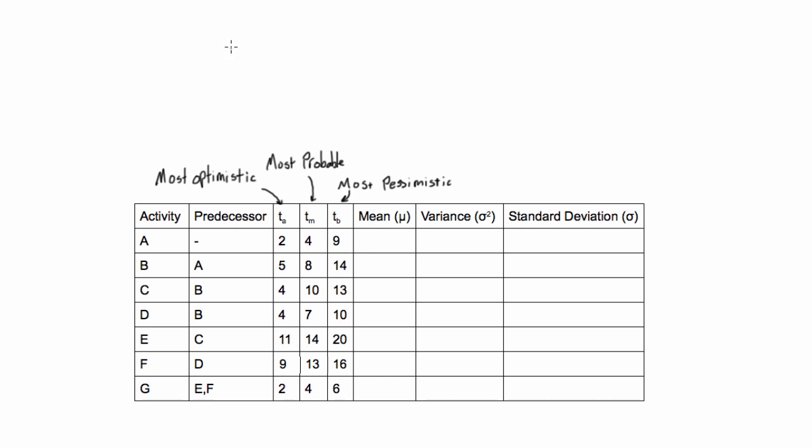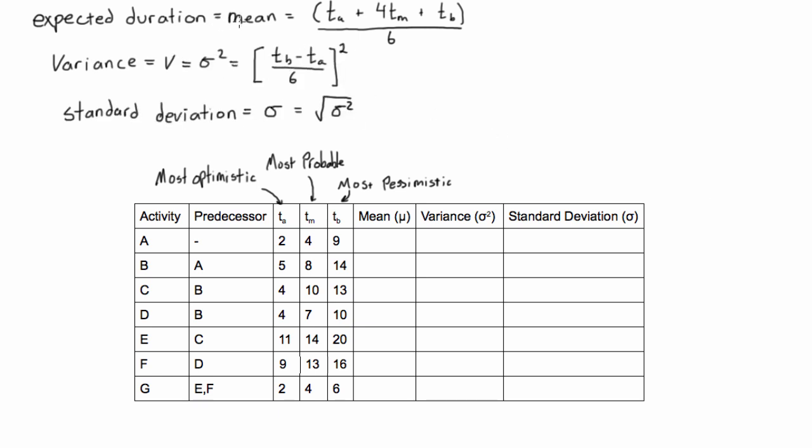So here are the formulas for the mean, variance, and standard deviation. So for expected duration, which is also the mean, we would have the formula being TA plus 4TM plus TB all over 6.